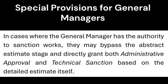Special provisions for general managers: In cases where the general manager has the authority to sanction works, they may bypass the abstract estimate stage and directly grant both administrative approval and technical sanction based on the detailed estimate itself.